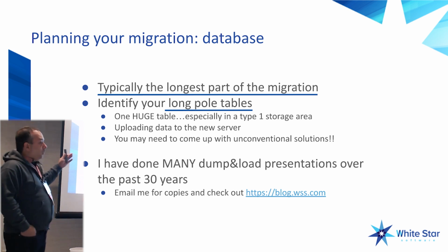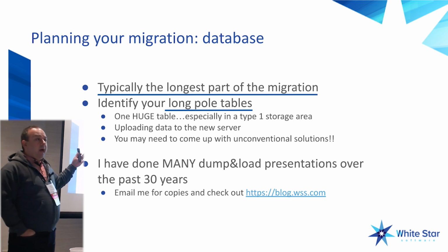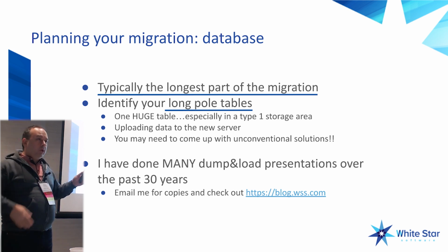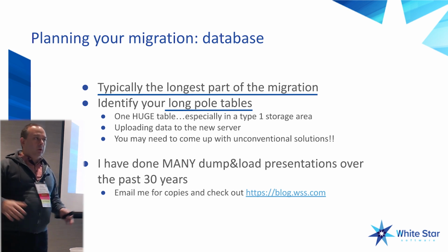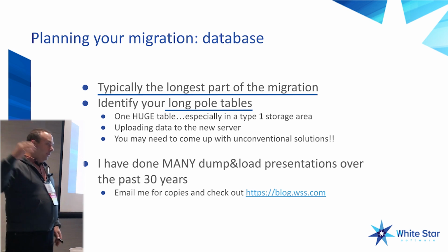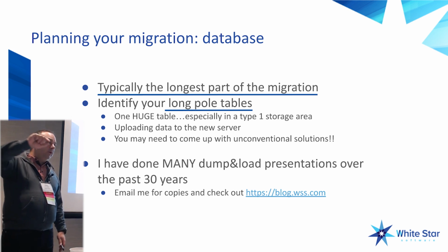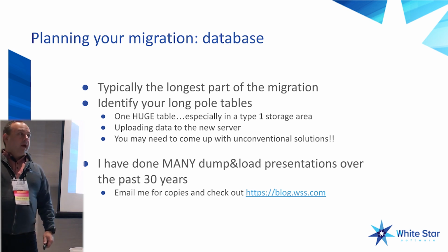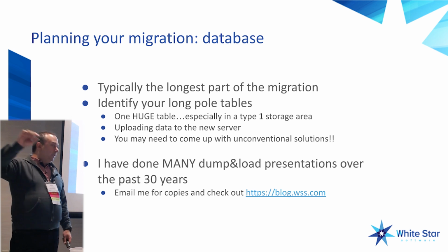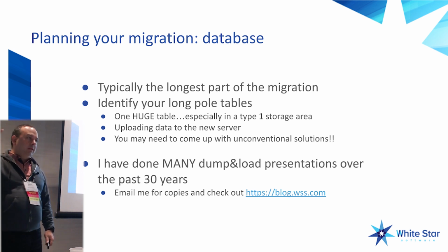So we are working with a customer just recently now who has everything in the type 1 storage area. They're about to hit the physical limit on the size, so now they have to dump and load. They've been putting it off and putting it off and putting it off, but they're within, I would say, 2 months now, right? So ProTop has a feature where it tells you how fast every table is growing and what the expected size is in a month and 3 months. So we can see, we extrapolate, okay, in 3 months you're going to blow the table, whatever, 1 month. So they know when D-Day is coming.